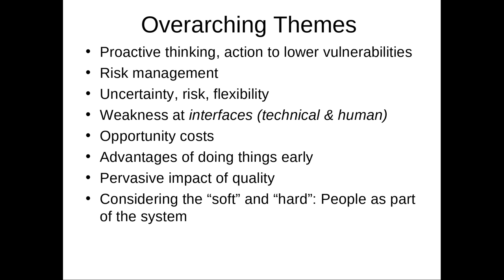So when it goes to fixing defects, one of the dangers is not just it may introduce new bugs, but we may not have time to find those new bugs. And the new bugs may not be familiar to us as this one is. This one is a known bug. It's the devil we know. We can document it. We can mention it and work around. We can set expectations on the part of the users.